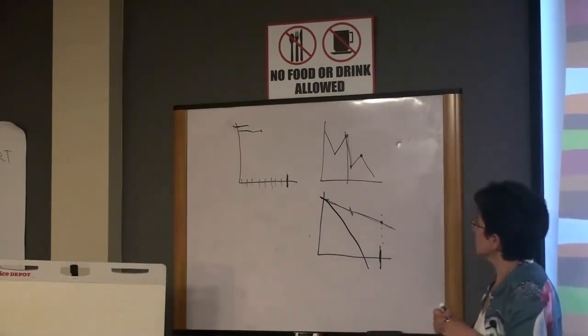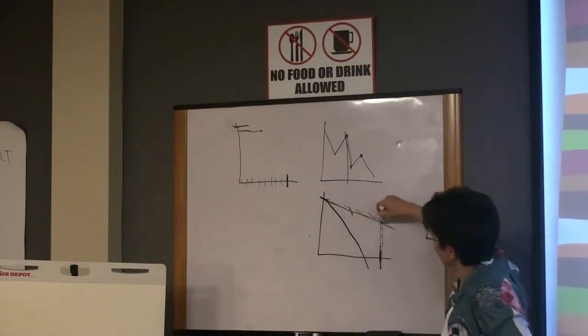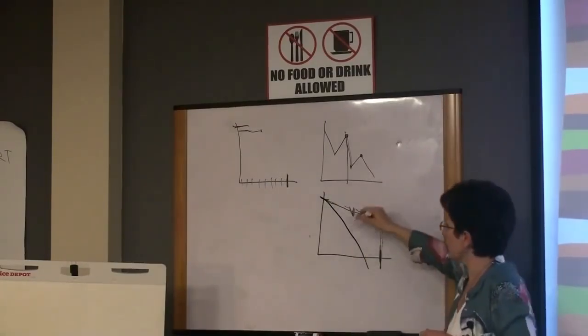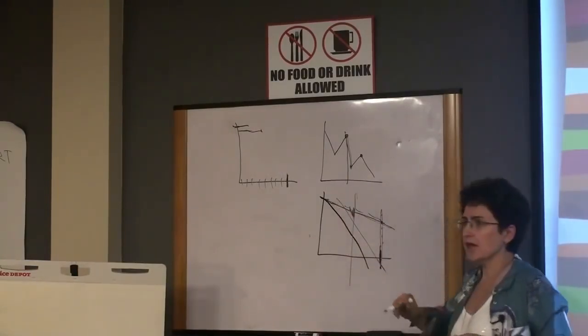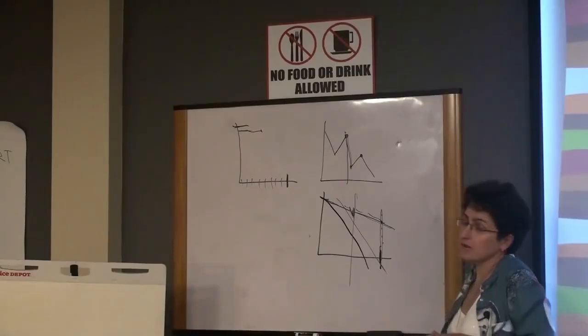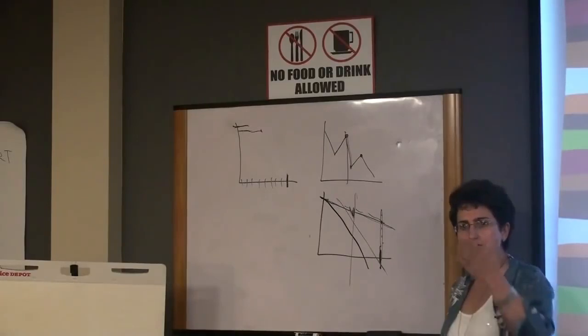That's a different story. So what happens if you have to drop or modify the feature set for the sprint mid-flight? You terminate your sprint and you start another sprint, which is a doable thing. And people do it in the field. I mean, this is what the market requires. Why do you need to develop a feature which is no longer needed?